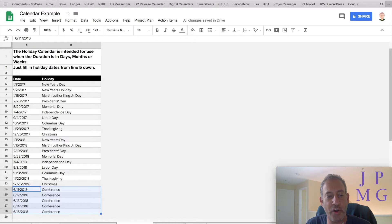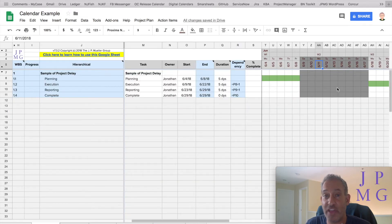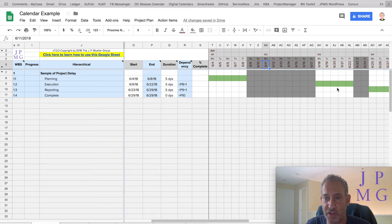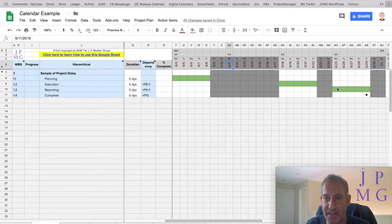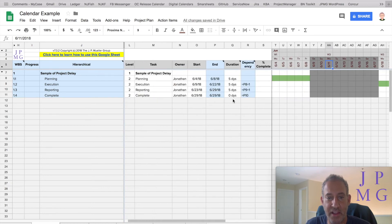We're now going to go back to project plan and you'll note that it has blocked out that whole week and pushed the dependent tasks down to another week, ending the whole project on 6/29.